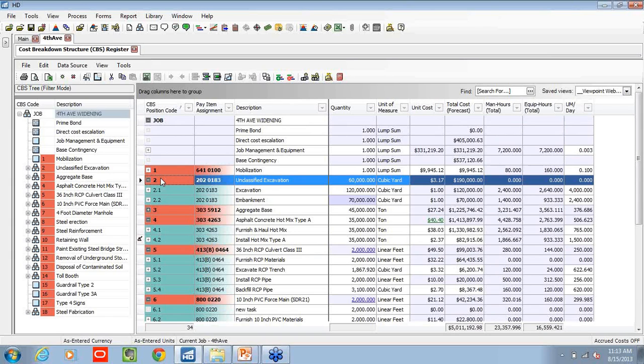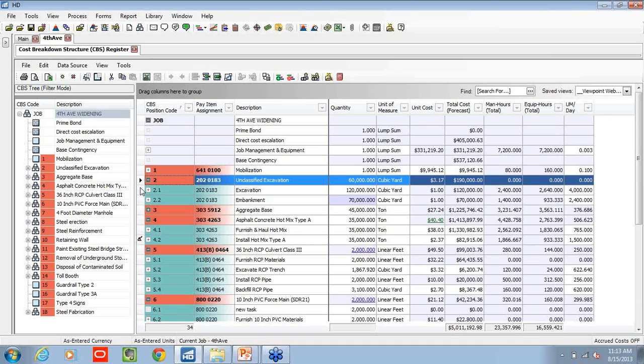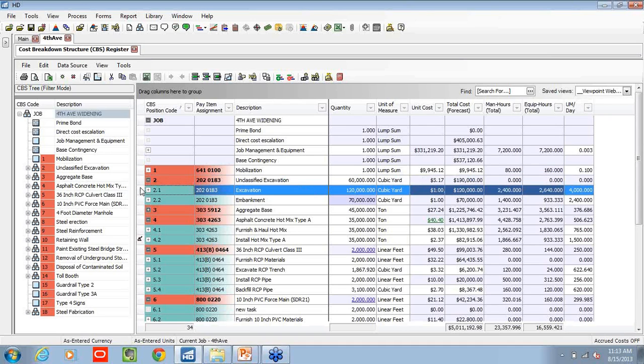As I go through my breakdowns, I might want to introduce new data sets or new data columns. So in that first scenario, we're looking at essentially just our cost and our quantities. Well, now I want to introduce kind of productivity. What are my total man hours? What are my total equipment hours? And what's my production per day?